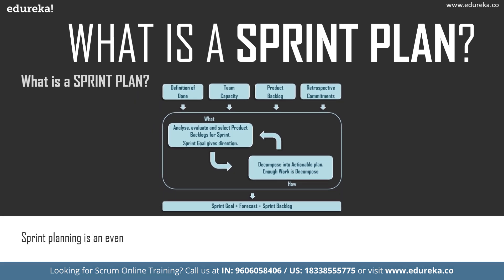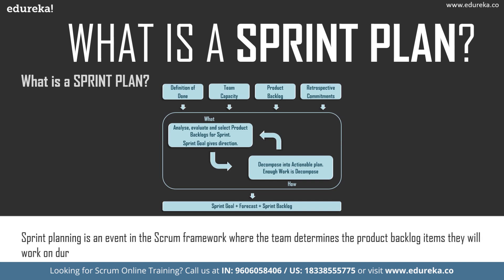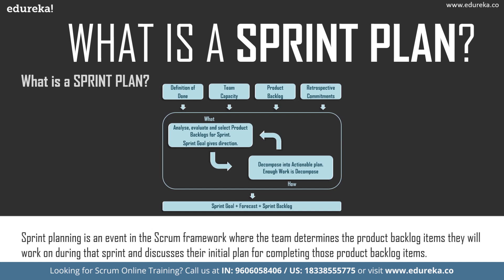Sprint plans are meant for the team to determine the product backlog items they will be working on during that sprint. This plan discusses their initial approach for completing what needs to be done in the most optimized fashion. Most teams find it highly helpful to establish a sprint goal and use that as a basis to determine which product backlog items they will work on.